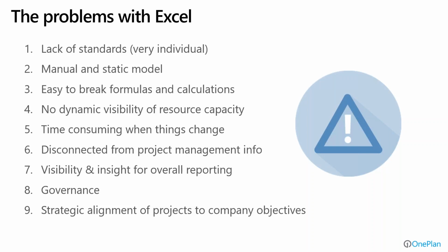As we all know, it's easy to break formulas and calculations and impact the integrity of the values in the spreadsheet. There's no real dynamic visibility to resource capacity on real resources that actually exist within the organization. And it can be very time consuming on that time-phased basis to change things when situations change and scenarios change that we're trying to address.